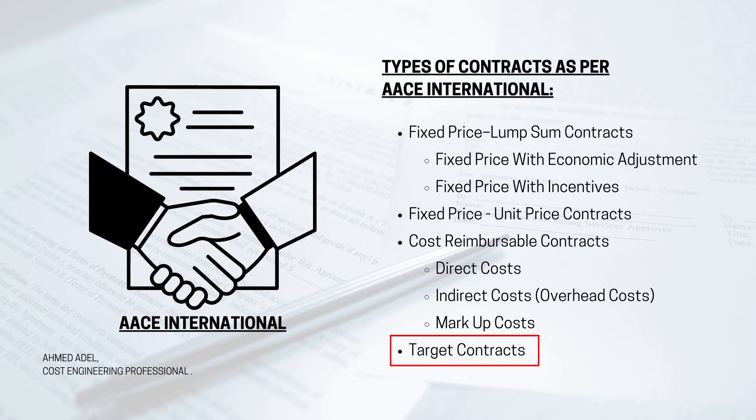With cost reimbursable contracts, direct and indirect costs plus markup are calculated during or after the work and submitted to the client. This puts significant risk on the client, since he doesn't know the total cost when signing. That leads to the fourth type: target contracts, where planning and design are awarded to the contractor and performed on a cost reimbursable basis.